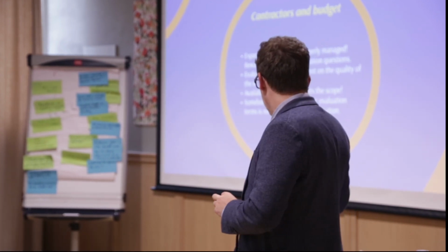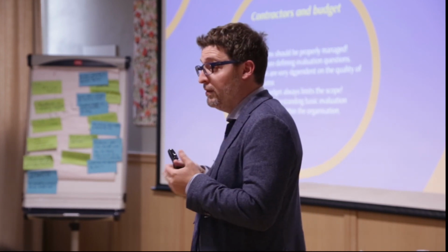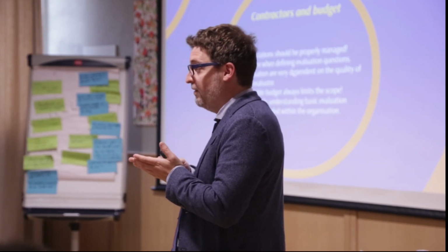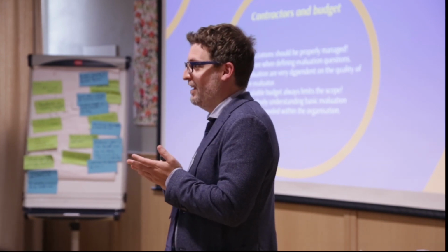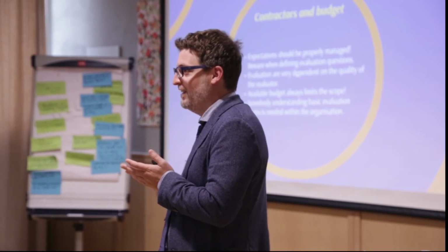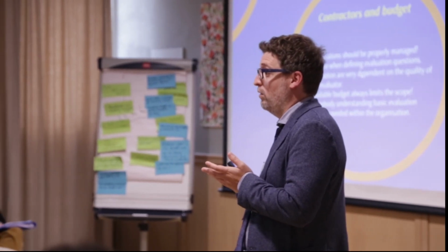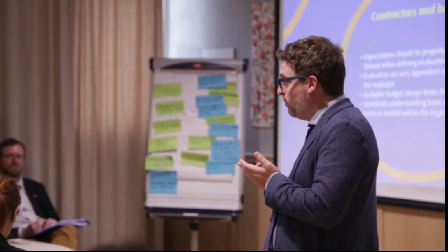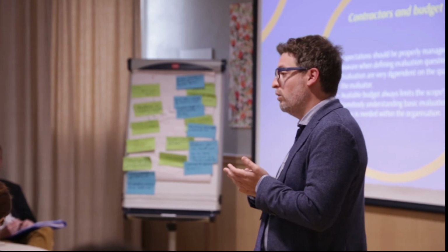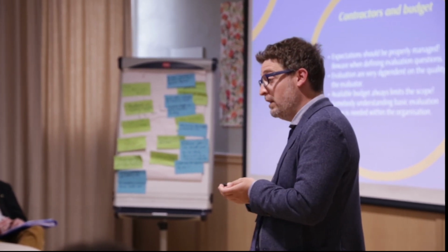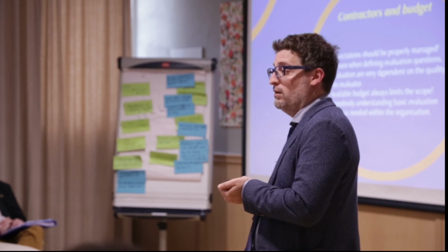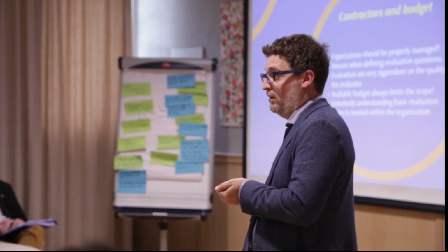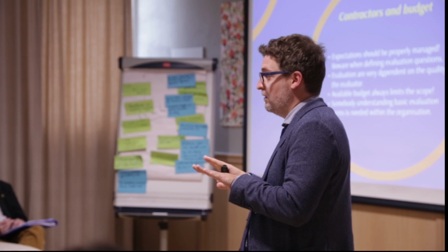And again, it's only my experience. You have to have control of the delivery. Payments only go out when there was a delivery, and when the delivery is of good quality. They have to understand that you are not willing to pay for something which is not good quality, and that you are open to cancel a contract if it is not delivered. And the earlier you cancel, the better.